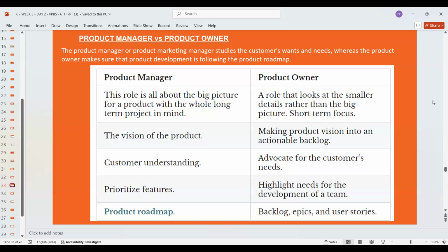The only thing is that for daily stand-ups, product owners are not mandatory because we understand they are at a very higher level and might have multiple projects. So that is the only time they are excused from being compulsorily involved in the stand-up meetings, but definitely all other ceremonies, starting with sprint planning, review, and retrospective,